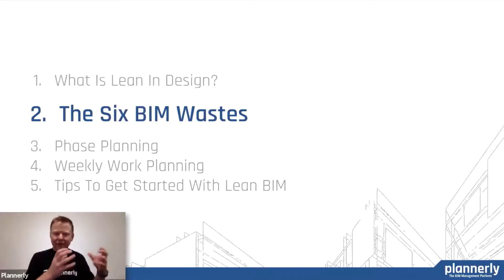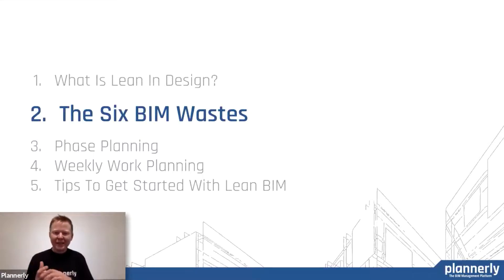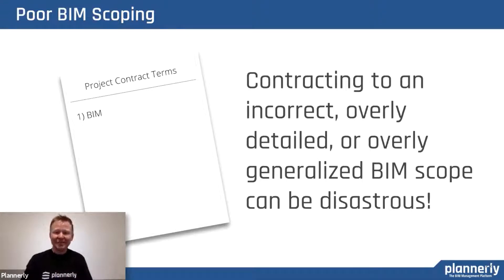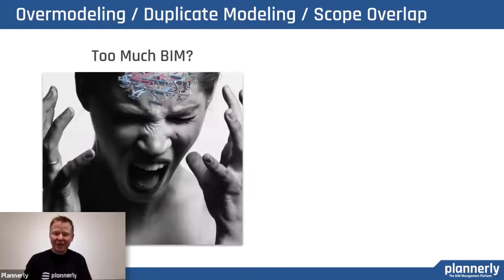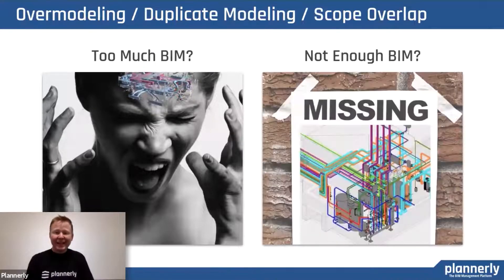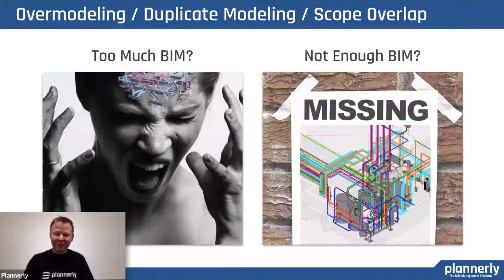So we've talked about lean in principle and the different terms used. Let's combine the two and start talking about what we're attacking in the BIM workflow. We've got six BIM wastes. The first one is poor scoping — how do you run a workflow that you have contracted for with maybe an incorrect, overly detailed, or overly generalized scope? It can be completely disastrous. The second is over and under production — too much modeling at the wrong time creates wasteful rework. And if the customer doesn't get what they need, they can't do their work. If it's a quantity takeoff and there's not enough BIM, the quantities will be incorrect.